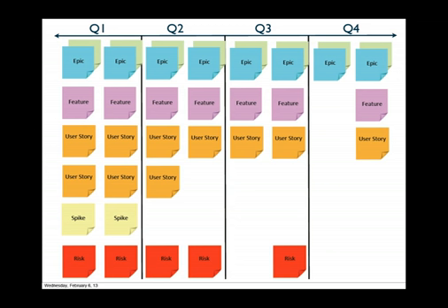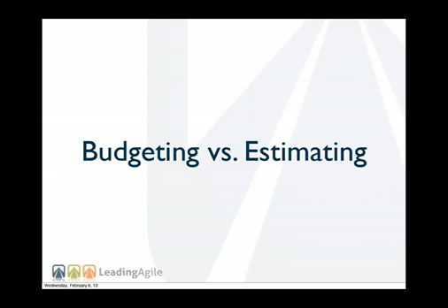Again, it's scale. At the team level, making and meeting commitments a little bit further in advance isn't as important. When I'm coordinating across multiple teams in a complex enterprise, the notion of being able to reliably hit a milestone date is huge. It's just absolutely huge. Again, not talking 18, 24 months out, talking about a 3 to 6 month kind of rolling wave plan. Okay, so that's a huge part of what we're going for here.